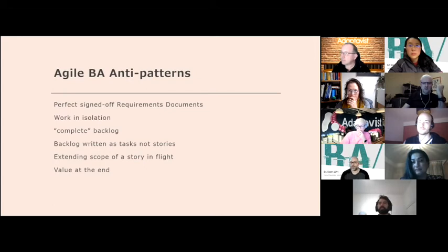So it's about making sure that you're concentrating on what you have to deliver. And I think Phil's point about those horizons is actually the stuff at the top of the backlog that you're preparing and are going to fill into your fairly close sprints. You do need to make sure that you've got those fully formed. But as it gets down to the bottom of the backlog, again, Phil's comment there that just the title should be enough for people to understand what that is. And they may drop out because there's a change that you haven't anticipated, or you get some feedback from a demo and actually that thing at the bottom needs to come up. So you need to look at refining that.